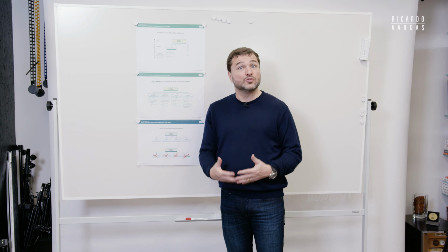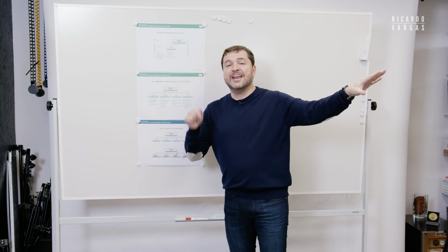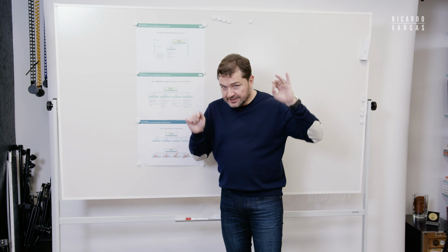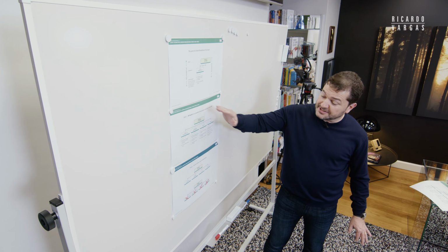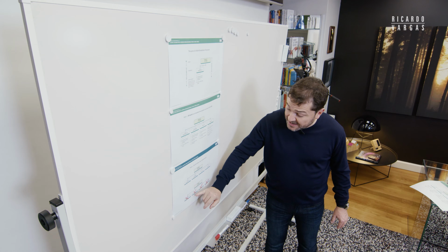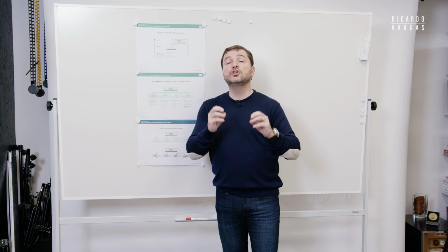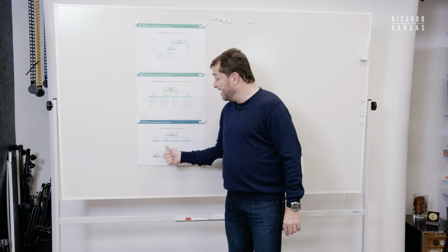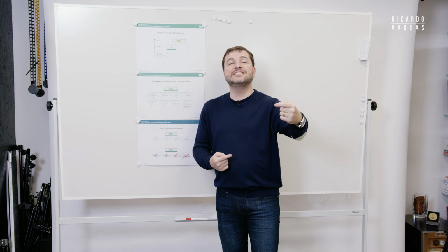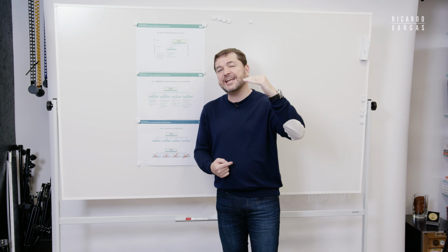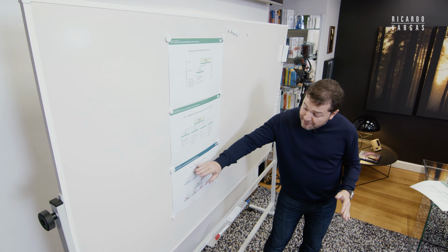The task list is what the person that is executing the project will really do, and on that task list you should use verbs. But on all the others, no, because otherwise people will think, prepare the kitchen, it means all I need is to prepare the kitchen, but they don't know exactly which are the tasks. But if it's kitchen preparation, I'm expecting that I will see the verbs and the items that I need to do to prepare the kitchen. So this is very simple: avoid verbs.